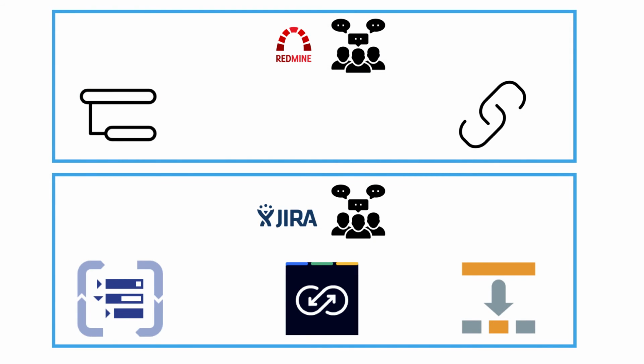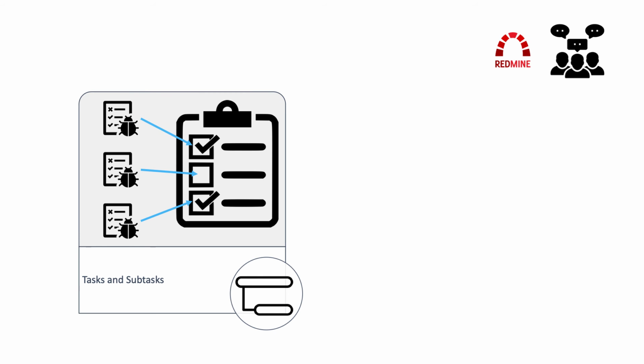Due to time reasons, I can only present the most promising solution approaches proposed in related work, Jira and Redmine forums. One solution is to create a joint Redmine task for all projects and subtasks for the respective affected projects. However, this solution is only feasible if all projects are handled in the same Redmine project.